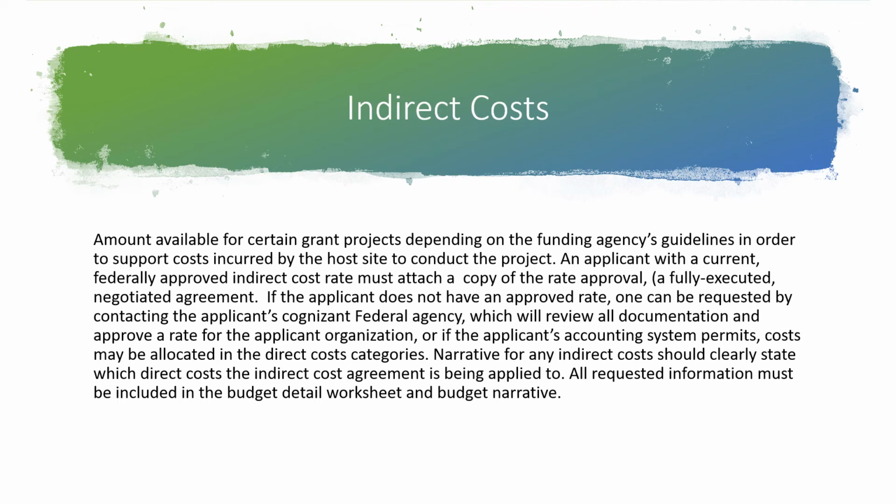Universities almost always have policies for indirect costs. Community colleges and school districts depend on how big they are and how much research tends to happen on those campuses. But basically this is a percentage of the grant award that is automatically given straight to the institution or agency that's hosting the research to offset any costs that they might have associated with hosting that research. Right? Anything like, you can imagine electricity for a building, right?